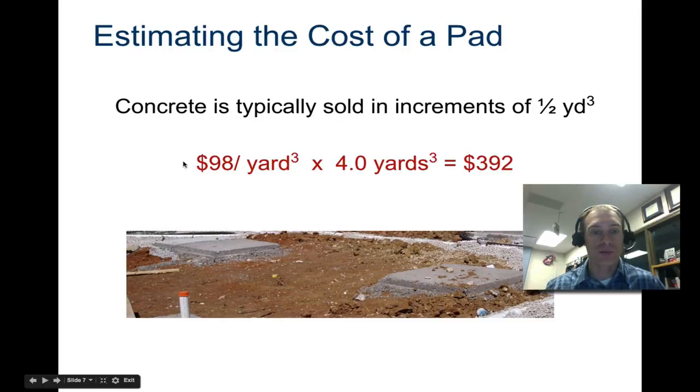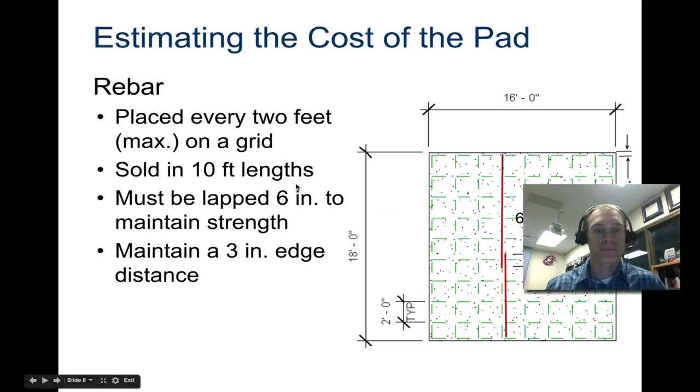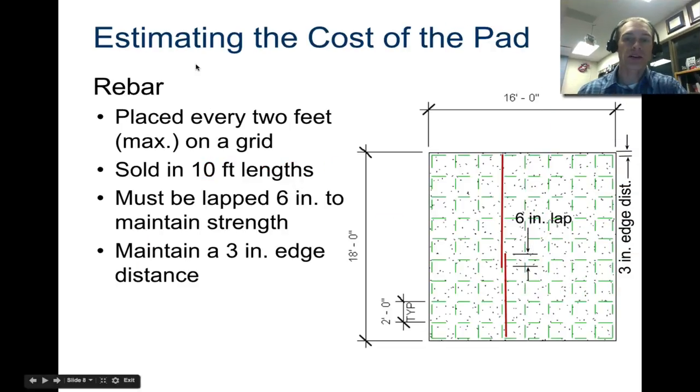Concrete is typically sold in increments of a half yard. If it's $98 a cubic yard, for example, then it would be $392 total. Now this is a little bit low price. Right now it's going to be a little bit more than that and I have price estimates on the assignment. If you're going to estimate the cost of a pad then you need to also calculate the number of rebar that you need. What we did in that prior example was calculate the amount of concrete and the cost for concrete.